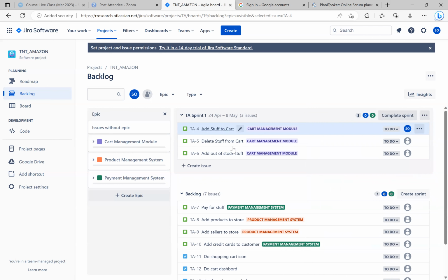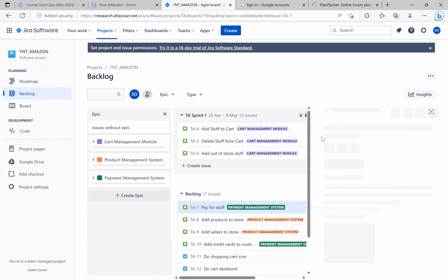So let me add it to, because you are not supposed to add anything to something once a sprint starts. You're not supposed to add or remove anything from the sprint, right? A sprint is we have agreed this is the amount of work we can do in 2 weeks. Once you click start, it has started. Life has gone. So you're not supposed to disturb them. You're not supposed to add anything to what the developers are already working on. So you're supposed to have done your task things and added all those before you click start on the sprint.